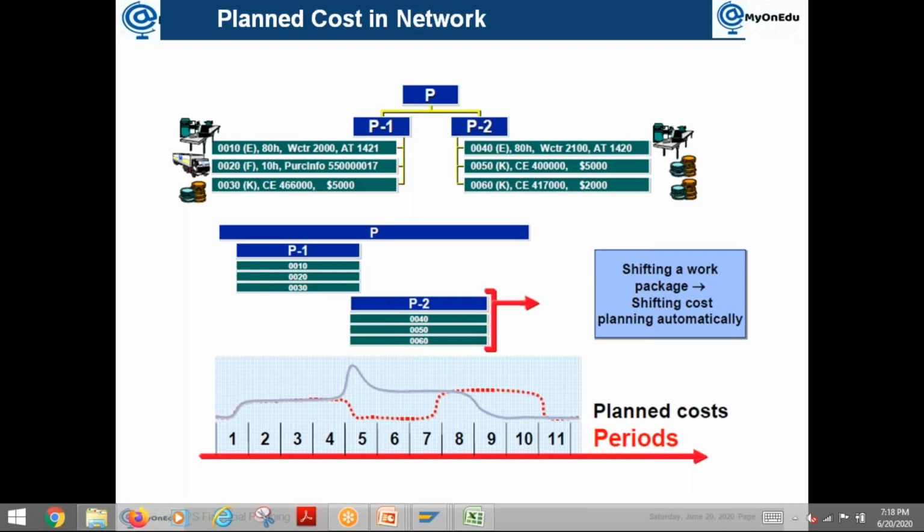But when you come to the external project, like for example, a contracting company is making a building for a customer, then that is an external project. For that, yes, you are controlling your project, because you need to know whether I will be able to meet my time as per this. That's what you are doing the scheduling. Now, in the automatic costing or network costing, what happens when you are making the schedule, you can plan your resources also along with that.